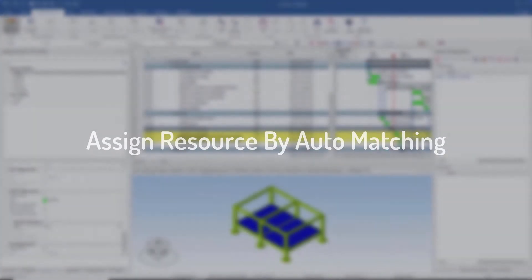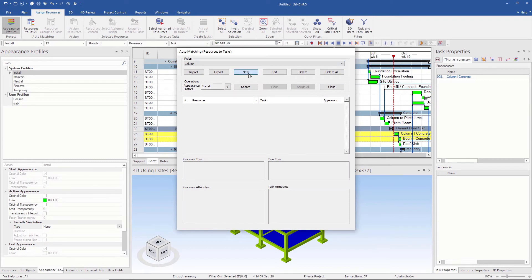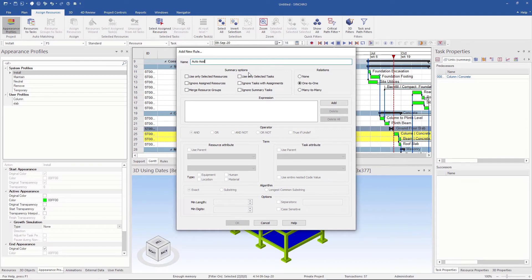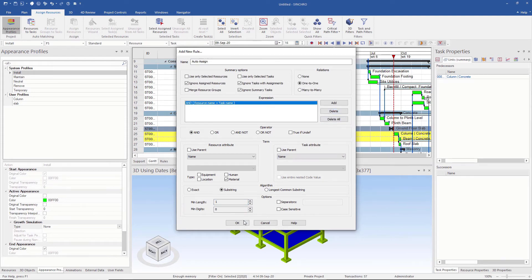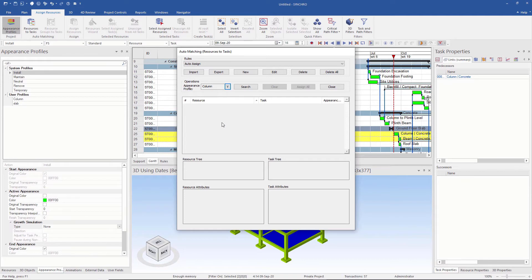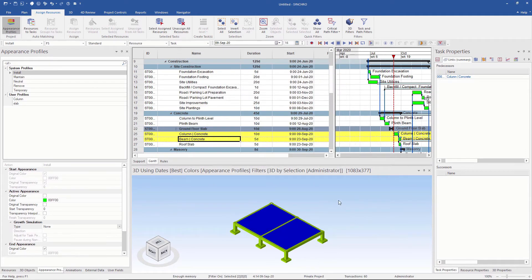Synchro can automatically assign resources to corresponding tasks for a given rule — this is called auto matching. To do this, we go to the Assign Resource tab and select Resources to Task. I create a new rule and name it Auto Assign. I want unassigned resources to be automatically assigned to a task if and only if the name of the task and the resource are the same. So I tick Ignore Assigned Resources and Ignore Task with Assignments. I want it to be applicable for all material resources, so I choose Substring, then save and click OK. Before searching, I choose the appearance profile. After searching, it gives a list of matching resources with tasks. To complete the assignment, I click Assign All. Now we can see all the assigned tasks. Let's have a look at the simulation.